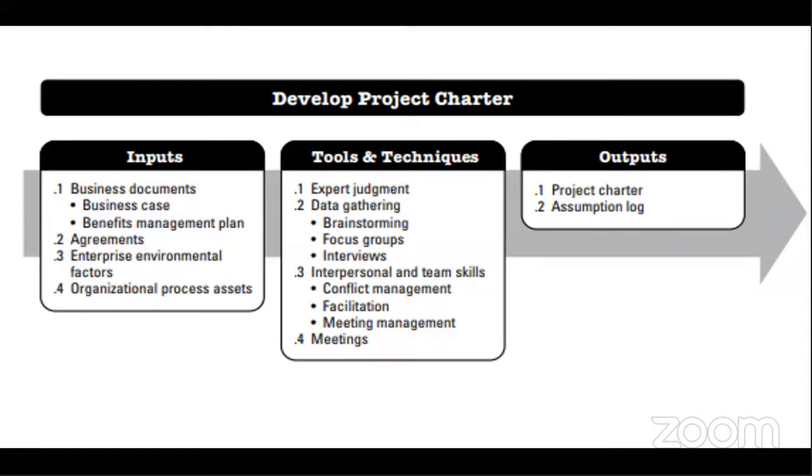So those assumptions also form a major part of the charter. They form a support document. So if you're going for bidding, you submit your charter, but the assumptions log helps you in your bid. Your assumptions log is proof that you actually did a good survey, or good research over the project.